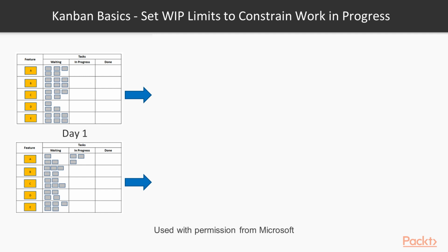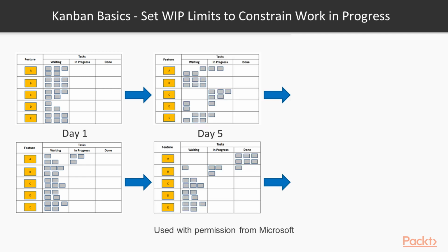So the first week goes past, and what we see is that the first team, which doesn't have any WIP limits, is working on a huge amount of stories simultaneously, whereas the team that are using WIP limits have completed feature A and have started working on feature B, taking the kind of lean approach to implementing not just what the easy tasks are or what they want to work on, but actually what's the highest value feature to the business. So this is using business value.